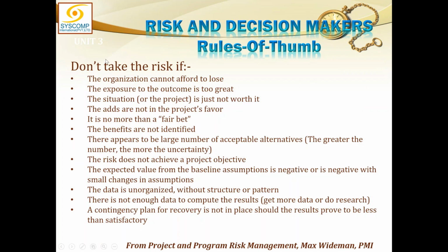Okay, then, you should not take the risk in the following circumstances. The organization is not able to afford to lose, so you can't take risks if the organization cannot. The exposure to the outcome is too great. The situation or the project is just not worth it. The odds are not in the project's favor. There is no more than a fair bet.